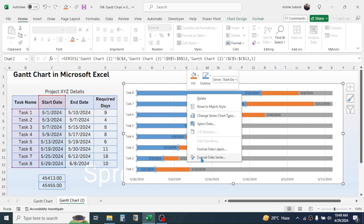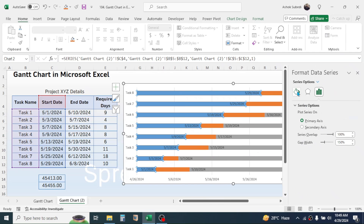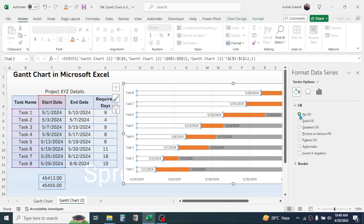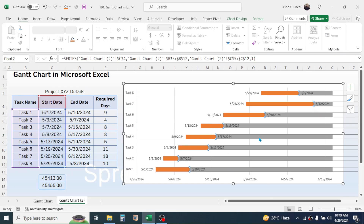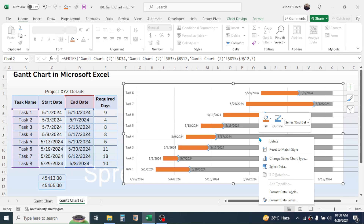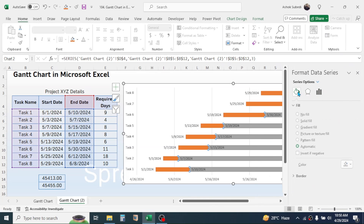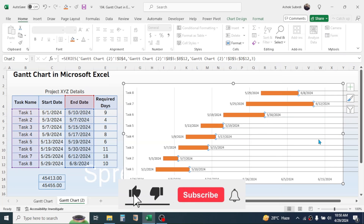Now click on the start date data series. We need to make this color invisible. Right-click, go to Format Data Series, click on the Fill option, and choose No Fill. Similarly, for the end date series, right-click, click Format Data Series, click the Fill option, and choose No Fill. Now the color is removed from both series.